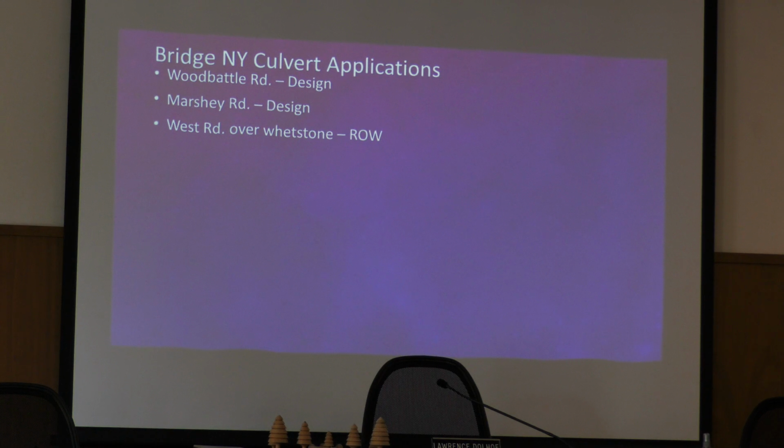And they used federal money originally to buy that park, so it's an enormous amount of hurdles. It's taken us almost a year to acquire about 5 feet to put the wing walls up. Gee, that's a surprise. Yeah, it's been brutal. That one's been very hard to get the right of way from the federal government in order to replace a bridge to give access to that federal property. Yes. That they require you to fix. Right. Yes, that we're being required to fix by them as well. So yeah, it's a very frustrating process.